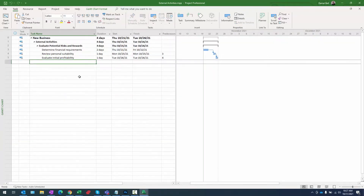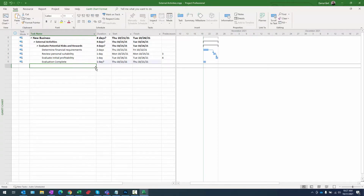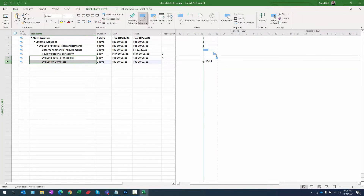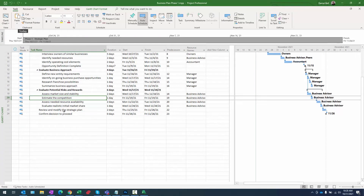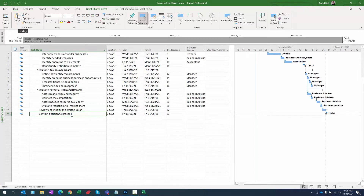First, I'm going to add a milestone to the external project. I'll call it 'evaluation complete' with zero day duration. To create a relationship, I'll click and hold drag from the predecessor to the successor — tasks five and six — then go to the task ribbon, schedule section, and click the chain link 'link selected tasks' button. Now we have the link. I'll save and close out of this external project.